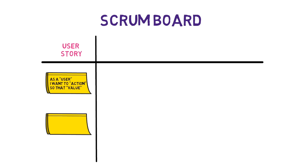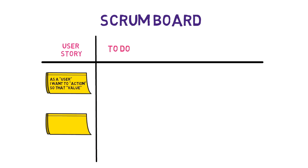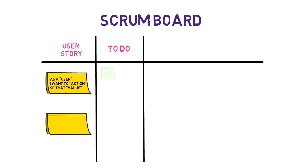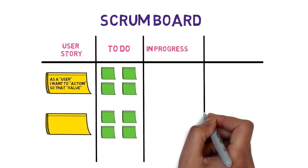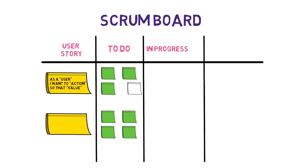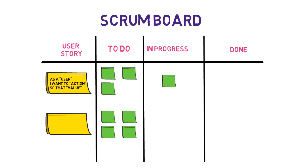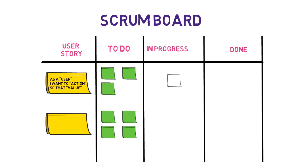Then we have the to-do column, and this will have the tasks of the user story for which the work hasn't started yet. These are displayed as cards or sticky notes and include important details. In progress - subtasks that the team is currently working on, and then done - the completed subtasks removed from the board at the end of the sprint.